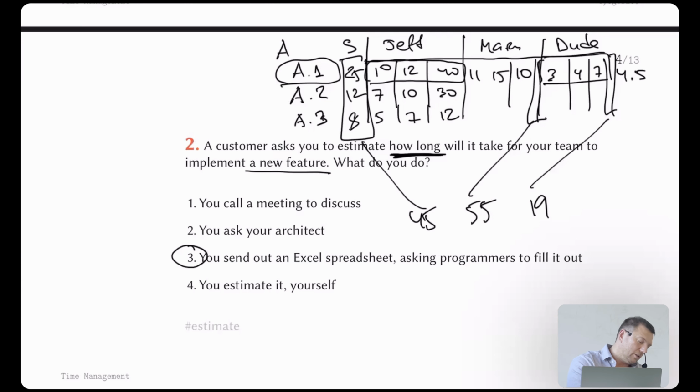But when I do all this, it's not only going to give me the average, but I can use all of these numbers also to have the best case, the most likely, and the worst case, because I put all the pieces together from all these people, and I will have 3 numbers for the customer as well. So I will give him the most likely estimate, a balanced estimate, and I will give 3 numbers. We will discuss a bit later why we may need to show the customer all 3 numbers, not only the middle line.